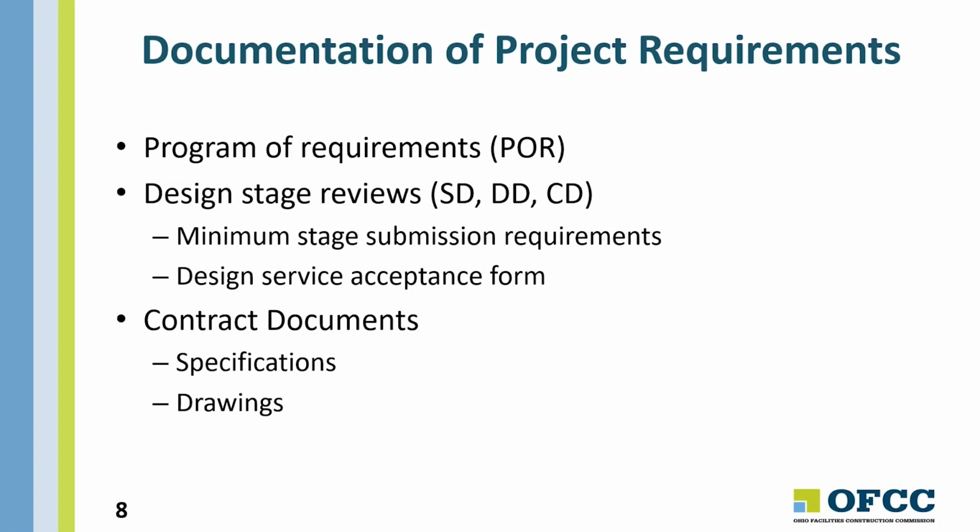And what we failed to do was determine whether that needed to be a 20 amp or 30 amp breaker and circuit for that centrifuge, and it turned out to be 30 amps, so we had a change order. So always try to document the requirements of your services to the greatest degree possible. And the program of requirements is typically done before you start drawing any adjacencies or creating any designs.